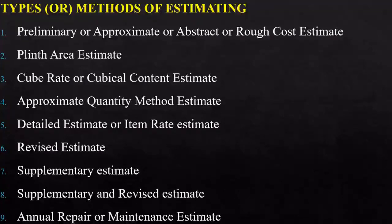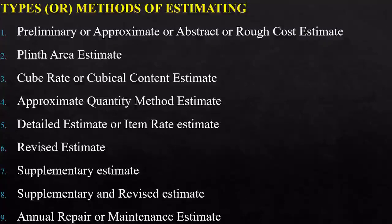The last type of estimate is the annual repair or maintenance estimate. This is also a detailed estimate that has to be prepared to maintain the structure or work in progress so that you can have a proper order and safe condition of your project. These are the nine types of estimating cost in the construction industry.